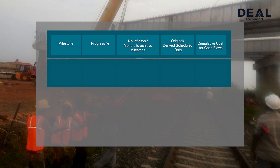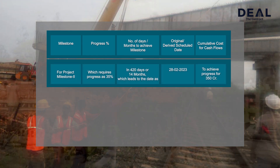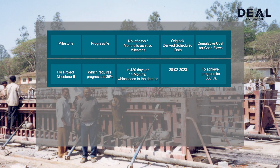For Project Milestone 2, which requires 35% progress in 420 days or 14 months, the date is 28th February 2023 to achieve progress worth Rs. 350 crore.